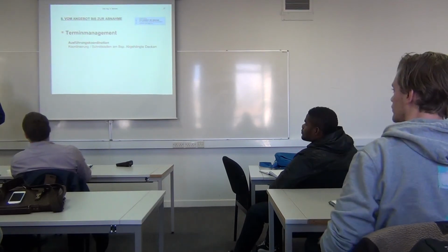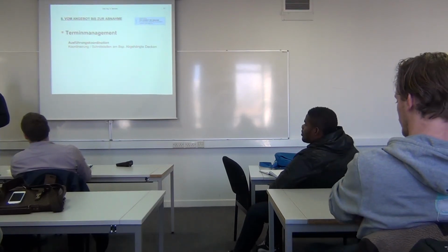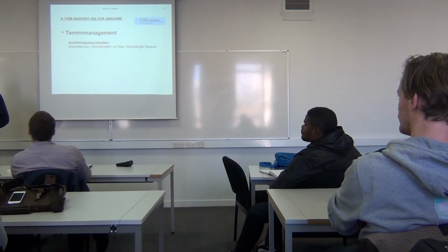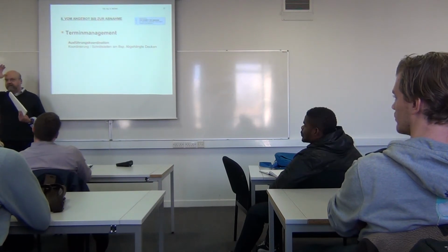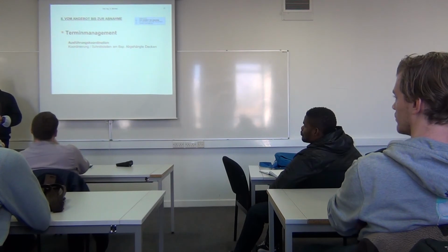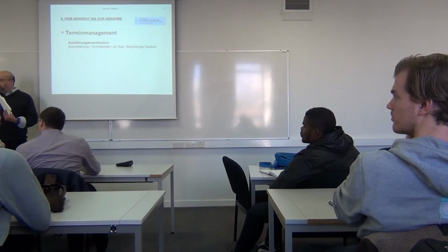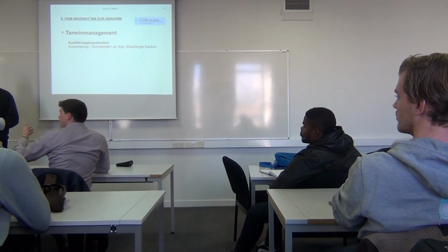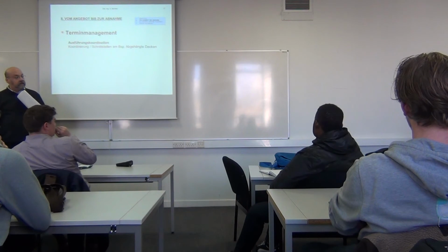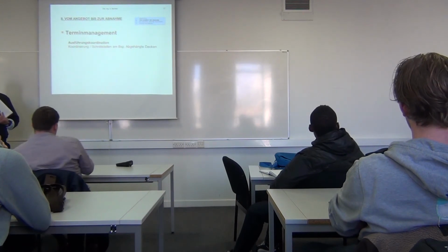The given thing by the client is the time. The client defines the given time, and it's not the contractor. The client defines you've got time for these works from, let's say, 10th of April 2014. How does the client give you the time if the client doesn't have the specification? The client has a team saying, give them so many months to do it. It's a duration that is specified. So you have like three months to do it, for example, for specific work that is pre-priced.